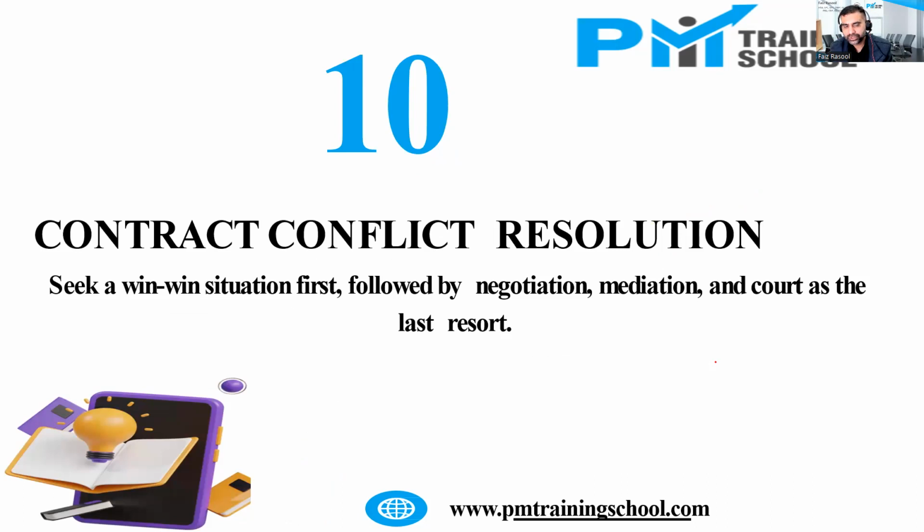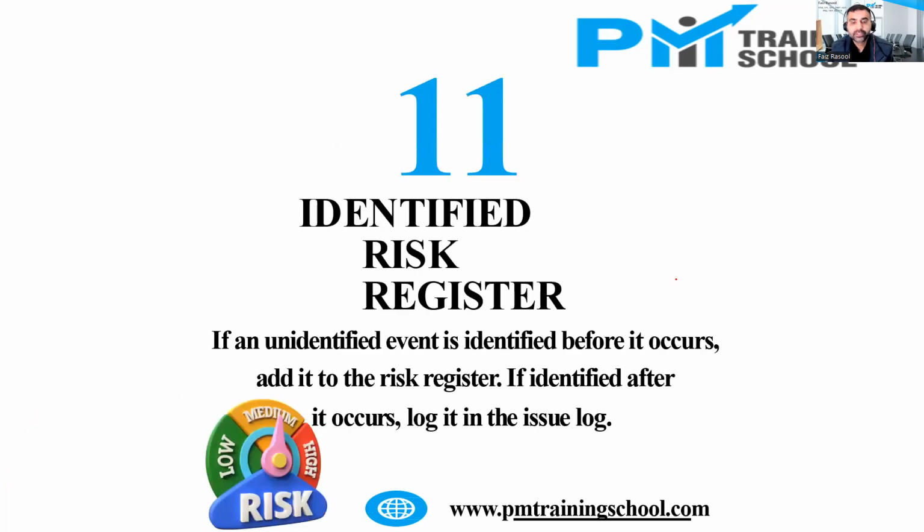Contract conflict resolution, the ways are: negotiate for a win-win situation. If negotiation doesn't work, mediation involving someone else, or going to the legal court as a last resort. So step 1, step 2, step 3. And this is from an exam perspective.